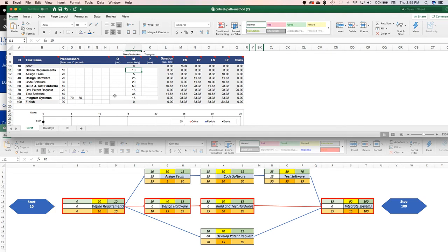And so we're going to take 2 days off for the optimistic, and add 2 days for the pessimistic, okay? Yes, the latest day that you think you could do it would be the pessimistic. But the way we're going to do it is we're going to take 2 days off, saying we're able to get it done 2 days early, or it's going to take us 2 days later for the pessimistic.